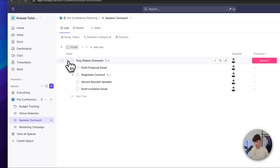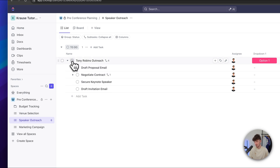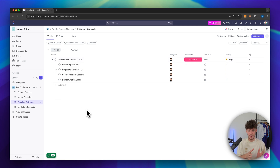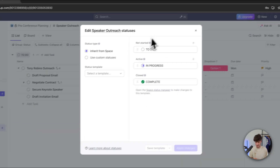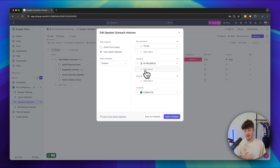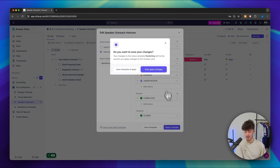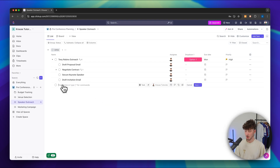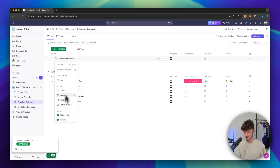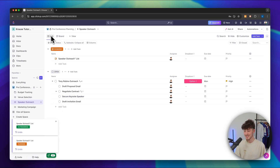We can hide our subtasks by using this arrow again. We can also change the status for each of the subtasks by simply clicking on it, and this goes also for the normal task. By default, we only have to-do, in progress and complete, which I don't really like — I think there certainly should be more statuses. To change and add the statuses, simply click on the three dots right here and then click on edit statuses. Right here we can add our statuses — click on use custom statuses and then you can add them. I've now added some more statuses and I'm going to apply all of the changes.